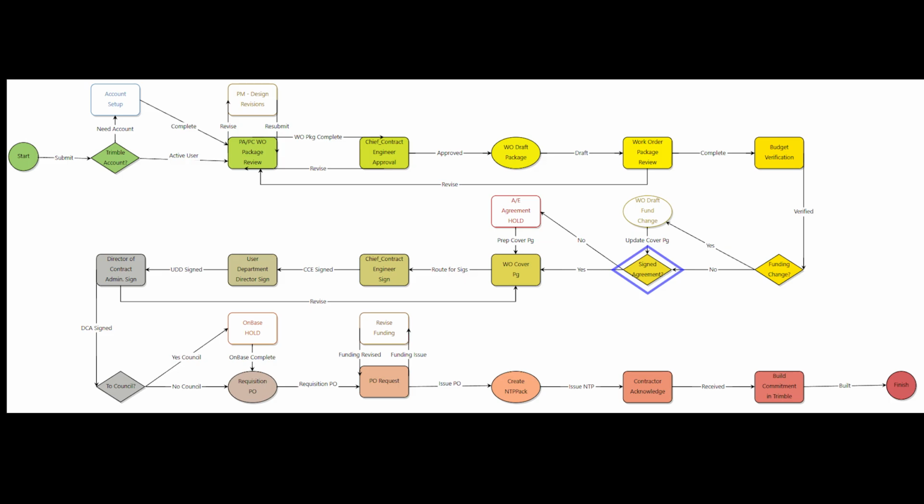If the condition is met that the agreement has been signed, it will go through the work order cover package process in which a cover page would be developed, which in the end will comprise the notice to proceed. If the signed agreement is still necessary, prior to it being able to be developed into a notice to proceed package, it requires that agreement to be executed. It will sit in this AE agreement hold step until such time as that document is received. Again, this is an Ani Hosferbeek step and or the assigned contract coordinator.